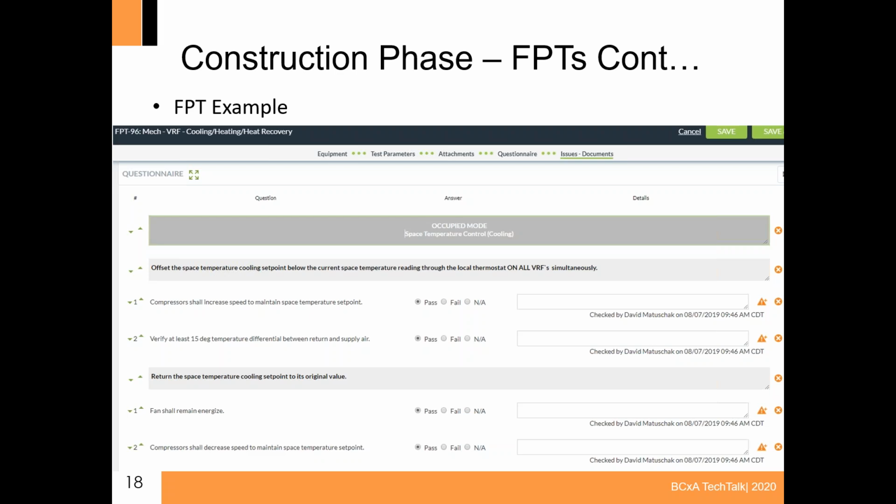But those are just to show exactly what you're testing in this mode and whether or not it passes. And then the next item is, if you created an action to put it in this mode, then you need to undo that action to put it back into normal mode. And so that's what that line item is. And then the 2 responses that are going to occur to go back to normal mode. And so it's fairly simple. You start it out in this mode, and then you take it back out, and then you move on to the next section.